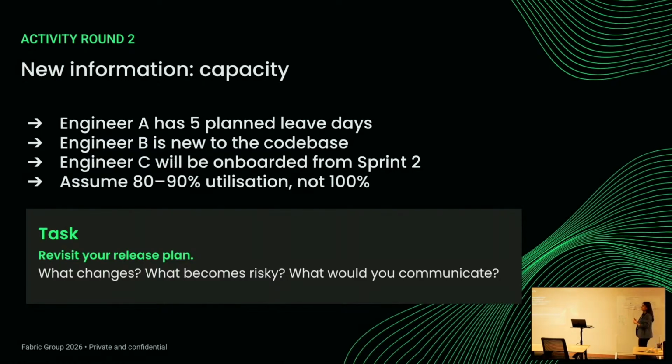For payment, do I have the payment integration sandbox environment available for testing? If not, can I really build that? Can I launch without testing it in staging? No. So this plan will shuffle even more when you add those dependencies. Let's say that payment was planned for sprint 3, but we are getting the sandbox only by sprint 4. My payment will have to go to sprint 5. That is another way in which your sprint plan changes and the timeline increases. So rather than 6 sprints, it probably becomes 8 sprints with those dependencies baked in.